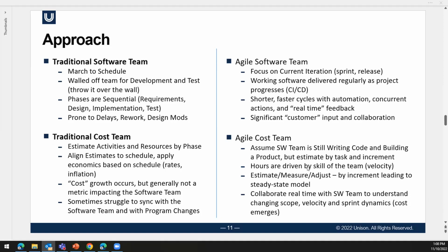Well, the Agile cost team has to be able to keep up with that Agile development team. And they have to be equal to and at least one step ahead. So they're collecting the history of these teams as they go in a specific language or with a specific application type. And they're applying those to the models, not going 2 or 3 years into the future, maybe going 2 or 3 sprints or 1 or 2 releases into the future. And it becomes very Markov-like. The only thing we know about the next sprint is what we learned from the last 5.